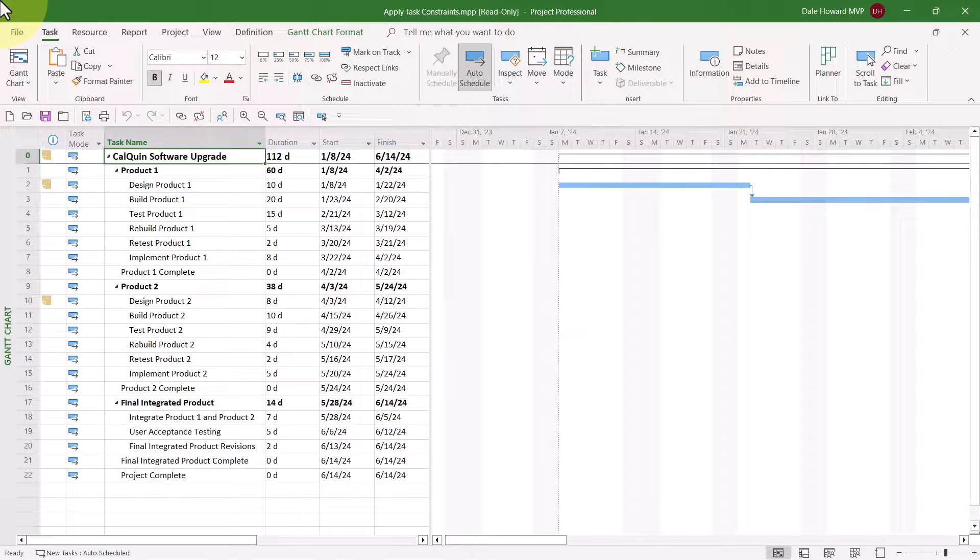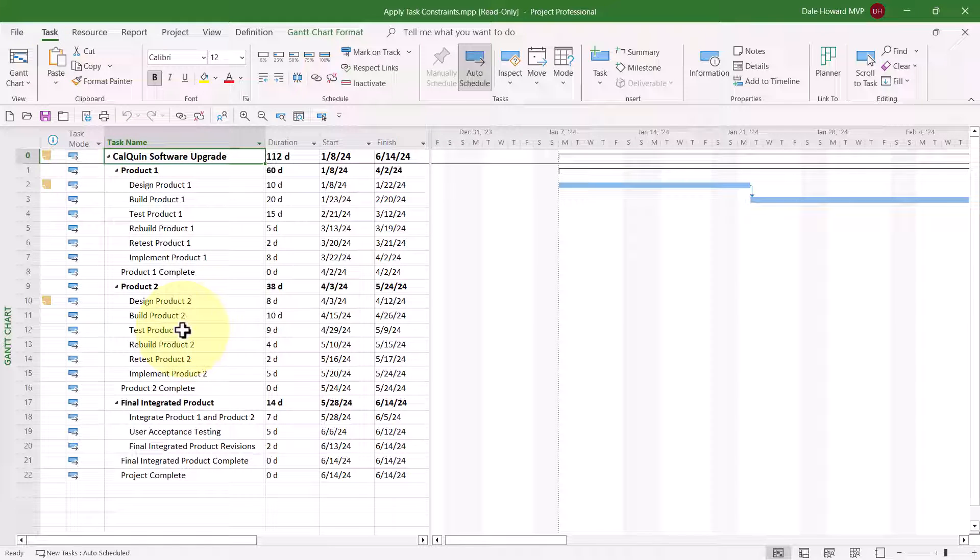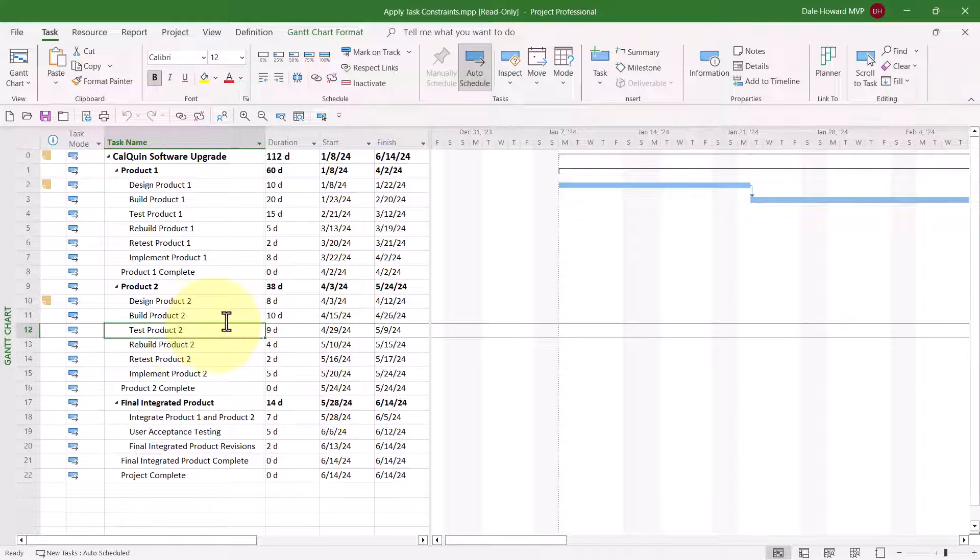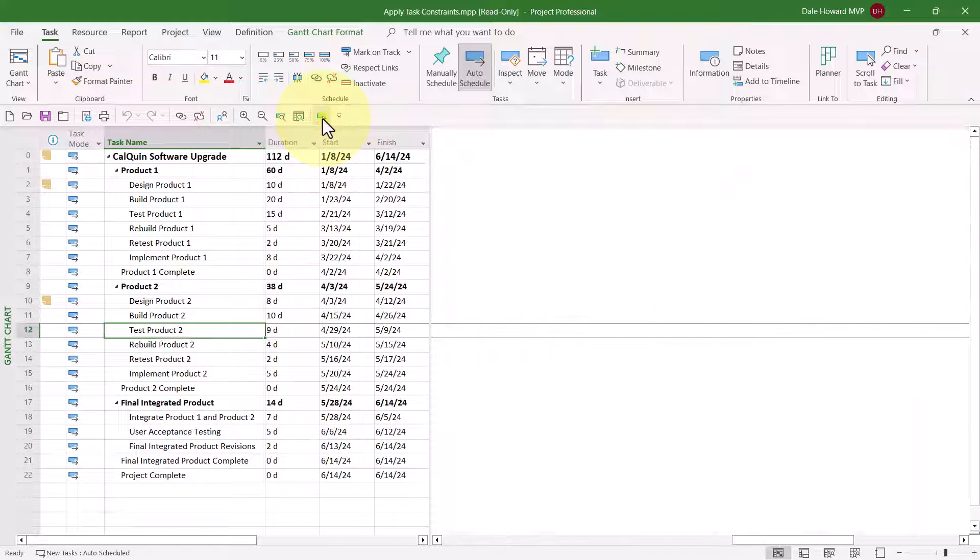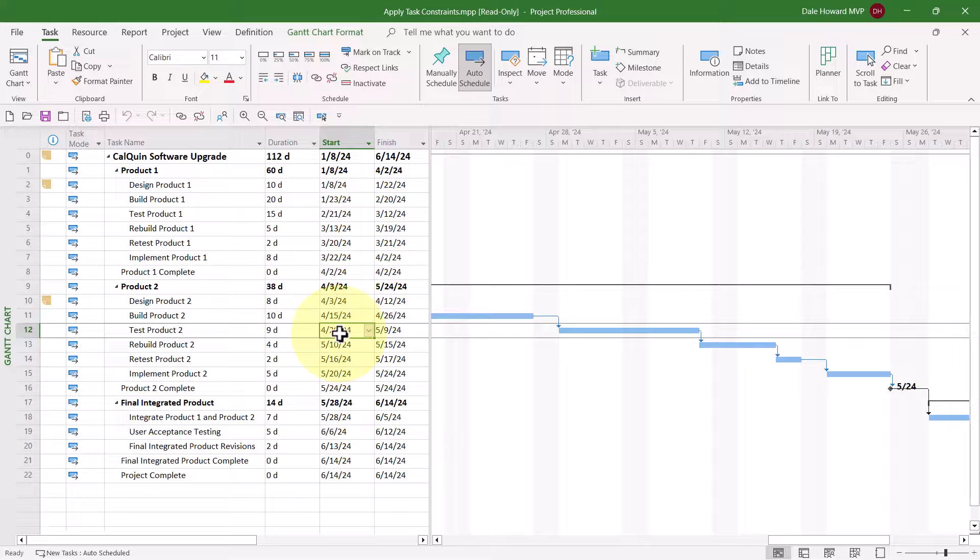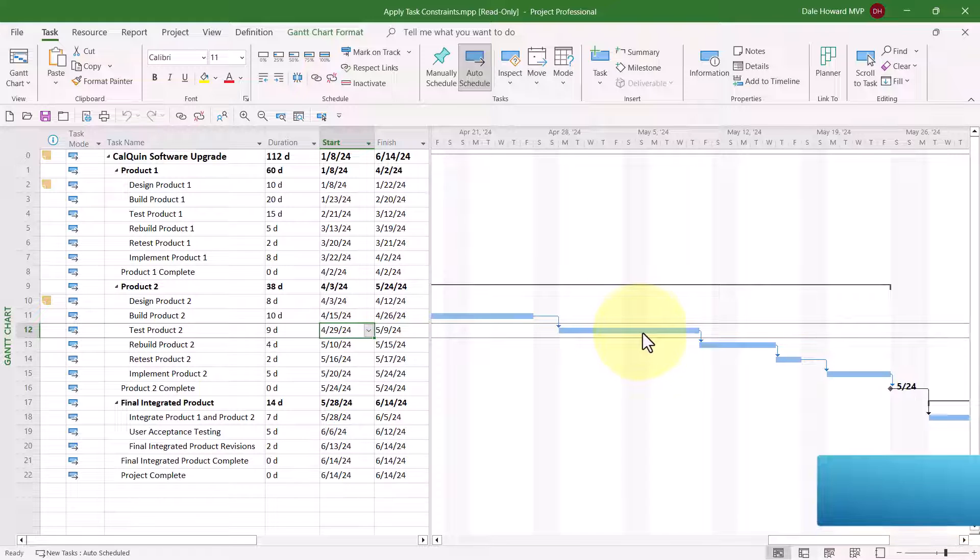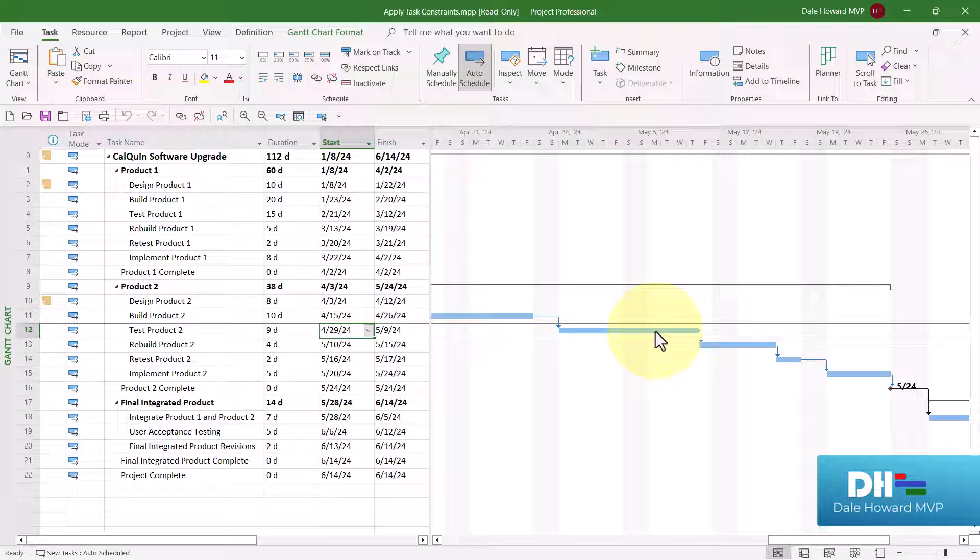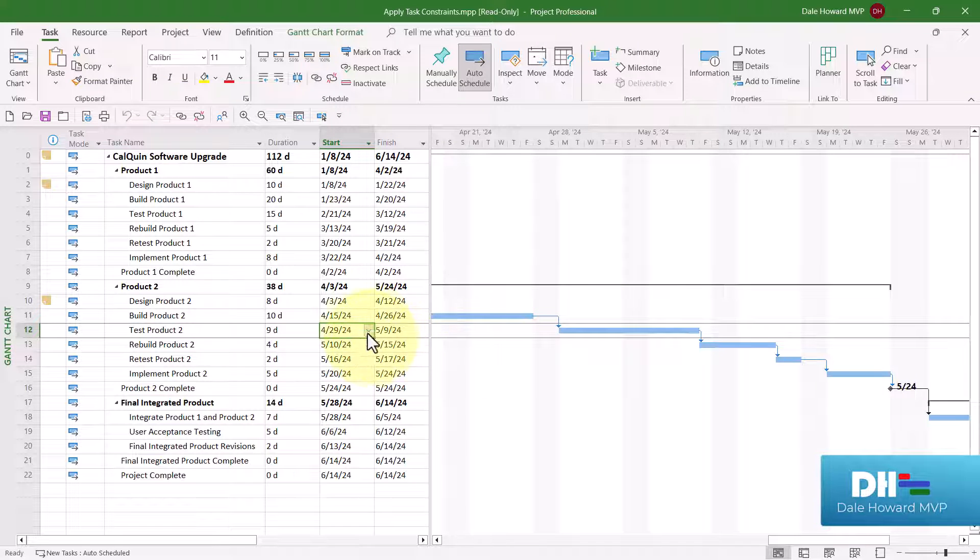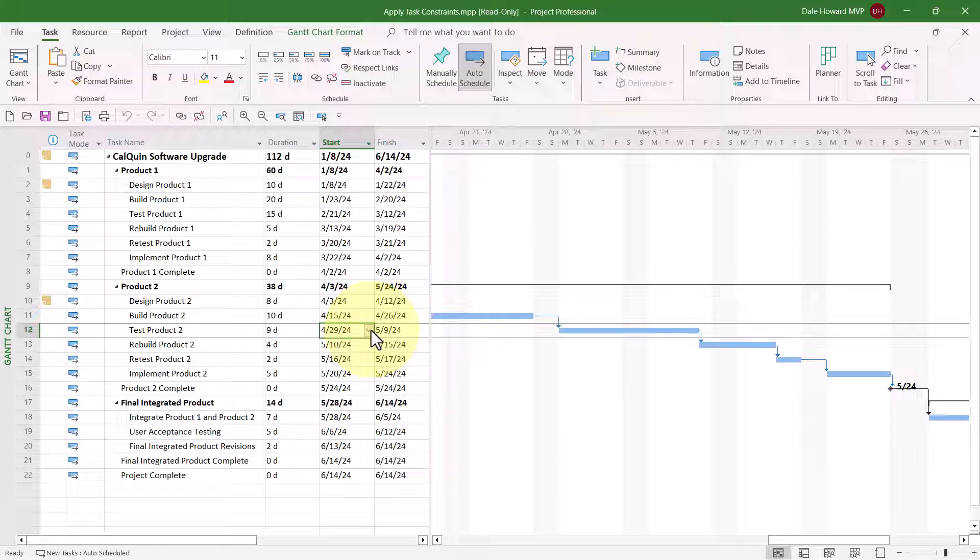In this project, there are two tasks that need a constraint. The first one is task number 12, the Test Product 2 task. You can see that this task is currently scheduled to start on April the 29th. However, it can't start on the 29th. It needs to start May the 6th or later because our testers are all committed to work in other projects. So we need to set a constraint to move this task to the correct date.